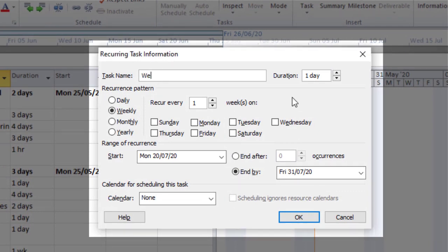We type in the name. This is supposed to occur weekly, once per week, and this is supposed to be done every Friday. And then you select that this should end after 3 occurrences. I'm going to do that. And remember, we said the meeting occurs every Friday.